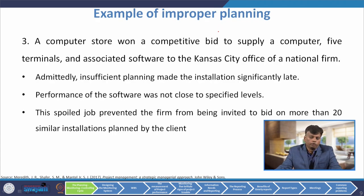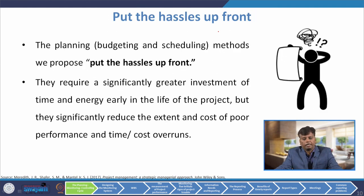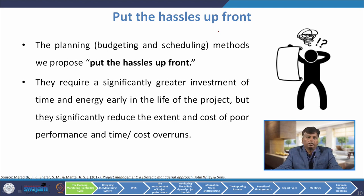A computer store won a competitive bid to supply a computer, five terminals and associated software to a Kansas City national firm. Insufficient planning made the installation significantly late and the performance of the software was not close to specified levels. This spoiled job prevented the firm from being invited to bid on more than 20 similar installations planned by the client. The planning, budgeting and scheduling method proposed here is to put the hassles up front — requiring a significantly greater investment of time and energy early in the project life, but significantly reducing the extent and cost of poor performance and time and cost overruns.